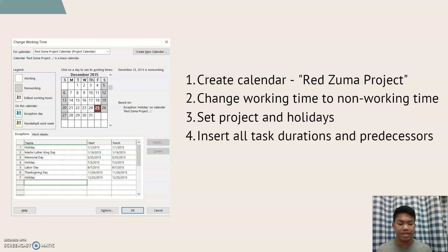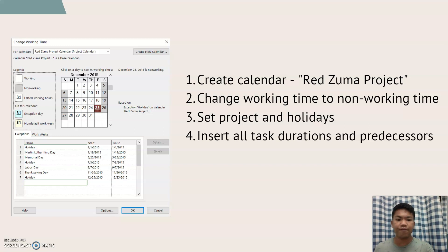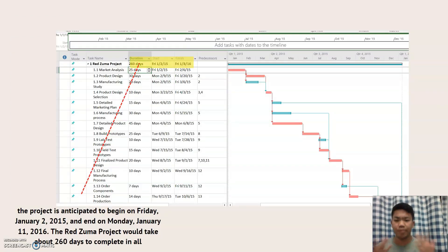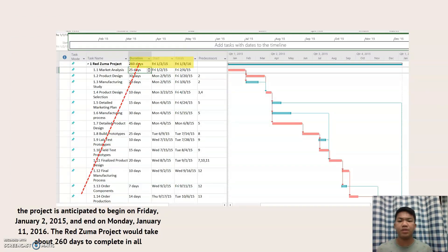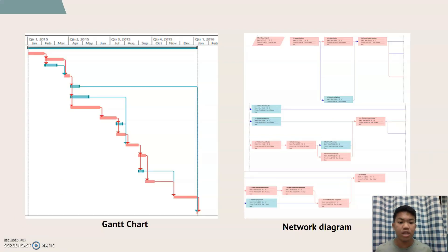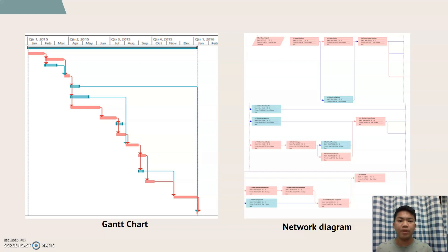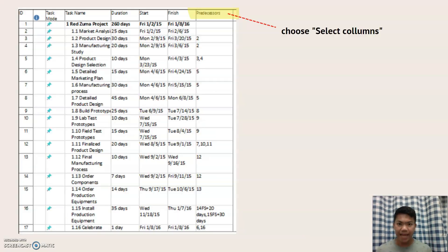From the inserted data we get the project figure, from which we can know the duration and estimated finish for this project, as well as the Gantt chart. We also convert the Gantt chart to a network diagram, from which we can see the critical path highlighted in red.